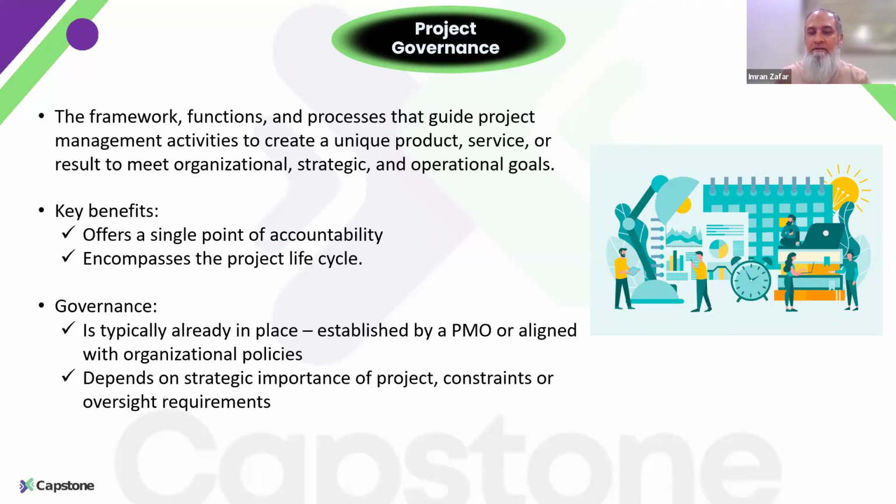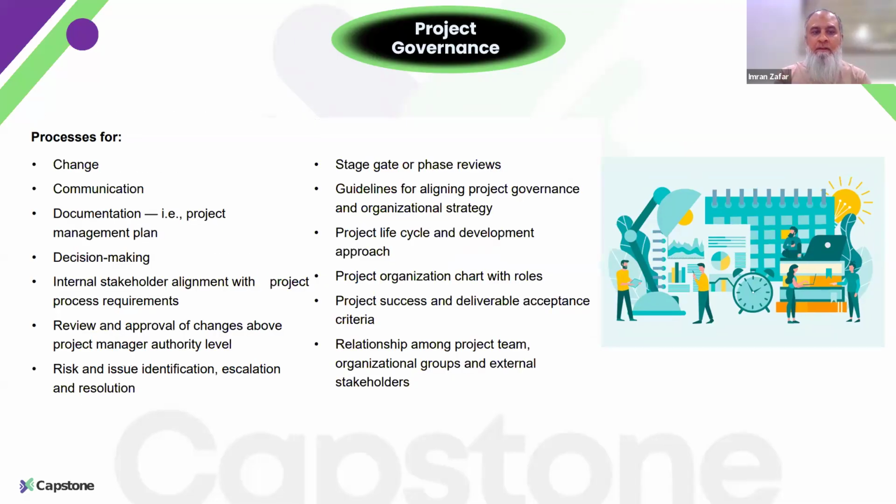Governance can be done by your PMO, it can be done by any steering committee, or your governing board. This basically establishes how different activities related to your project will be governed as you go along. The change control board is also a governance factor which governs how changes will be handled throughout the project.